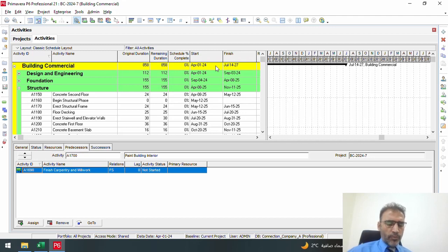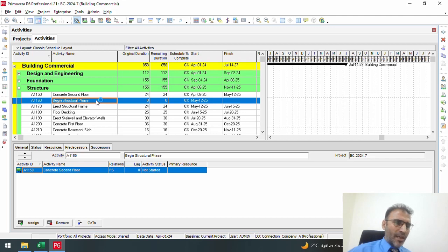To optimize our project schedule, we need to refine it based on many criteria. The first method for optimizing our project is to set relations so we can run multiple activities at the same time, if we have a lot of resources and good scheduling.